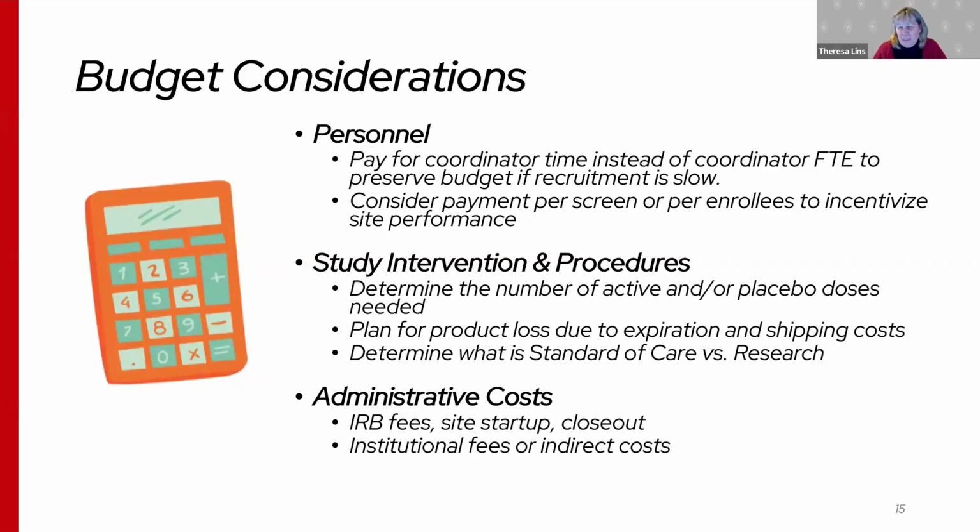But if the budget agrees to pay for the time it takes study coordinators to complete various tasks, there will be money left over, even if the recruitment takes longer than anticipated. Also consider paying per screen or per enrollee to incentivize site performance.